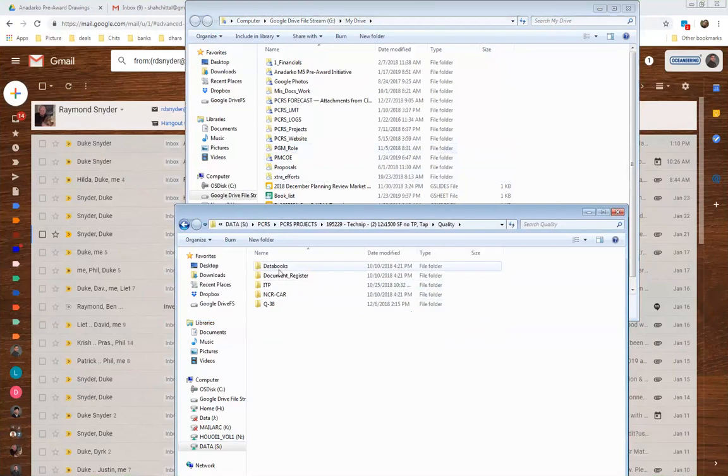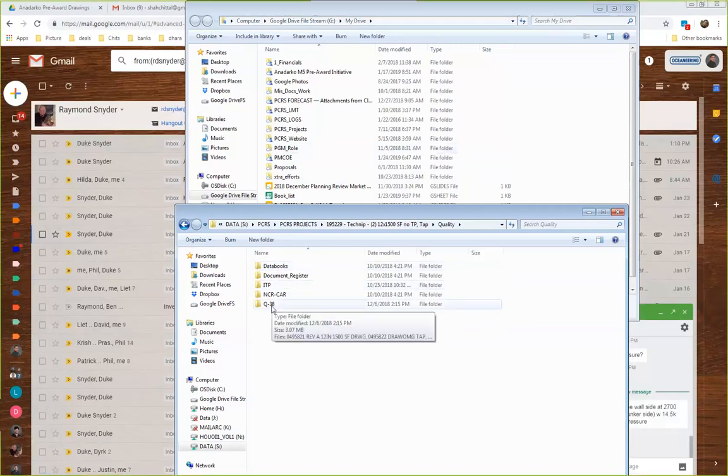What they do is they take this Q38 form I was talking about. PCs also do the Q38 form, by the way. Q38 has the steps on it: for what assembly, use this procedure, use this FAT, do the steps, use all these parts. Once assembly is done and all the sign-offs are done, that information goes to them, and they can pull all the data to build the data book. So that's why that form is kind of important. It pulls the information through. So the Q38 form stays here. Quality owns Q38. Even the PCs do it, quality owns it.